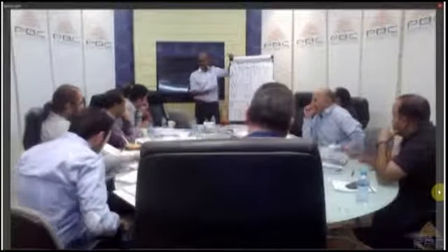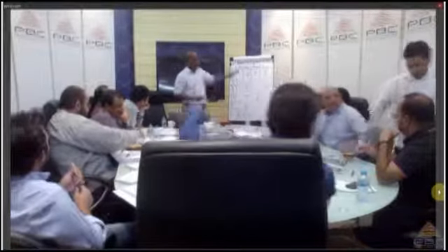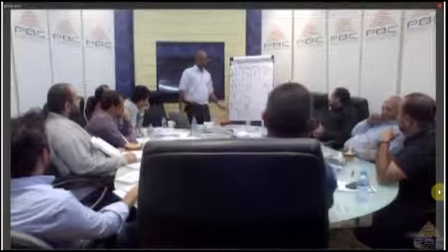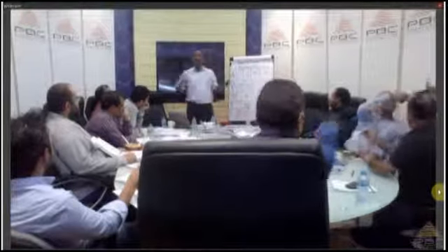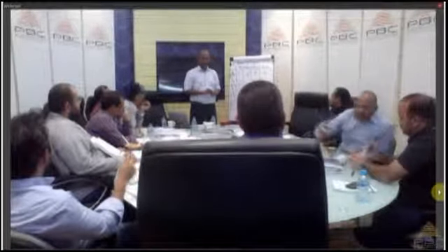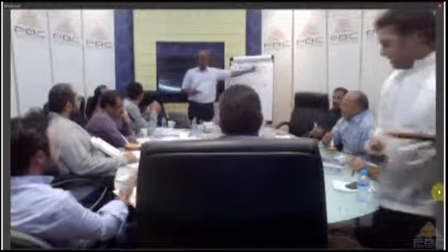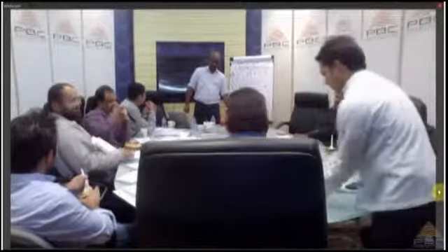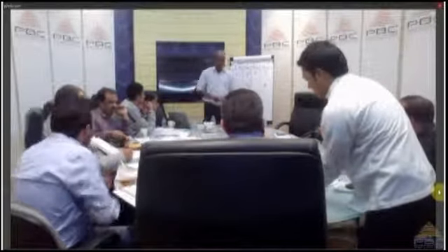Okay? So you see here, by going through this process, at the end of the plan, Abdul Hamid will know what he's going to do in each stage, right? We have Wahib and Osama. So everyone will be clear about their roles and responsibilities. So the RAM, responsibility assignment matrix. RACI stands for responsible, accountable, to be consulted, to be informed.